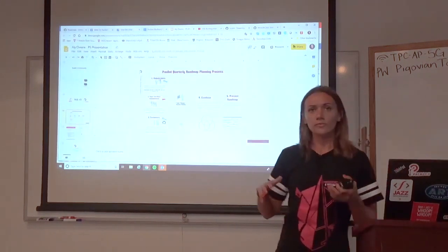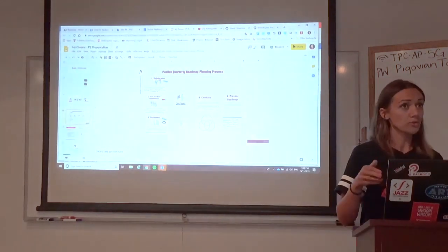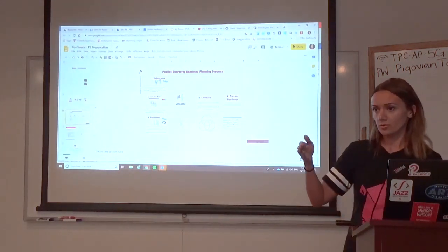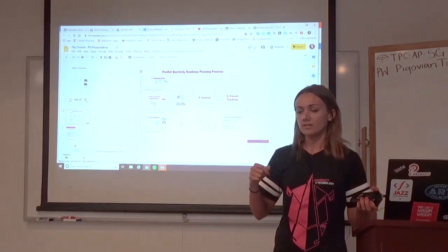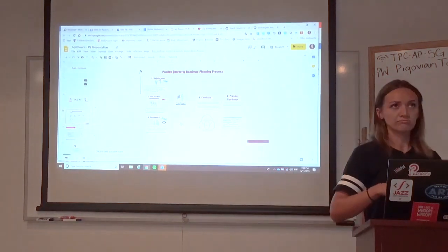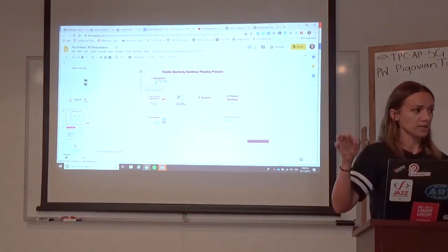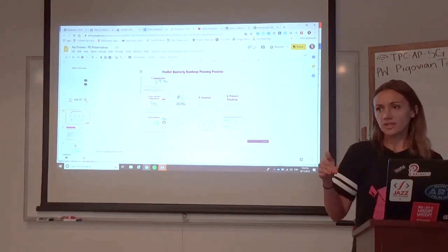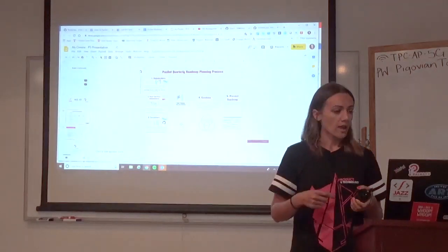So you have the time when we tell you, okay, right now is Q3, right? Q4 starts October 1st. My next sprint roadmap planning is September 26th. I sent out an invite like a month ago already. I let them know that this is the link for the idea board if you forgot. Please send your information or your requests, and we'll discuss it.